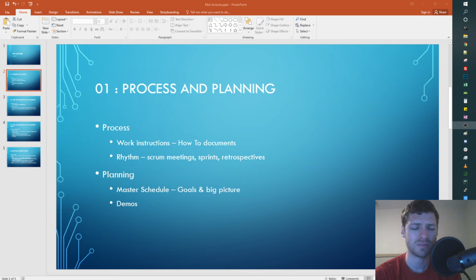So I think if you have those demos, it holds people accountable, and it also forces people to work together in trying to integrate the software on the target hardware or on the simulation. So those are some interesting things that I have found regarding planning and processes.